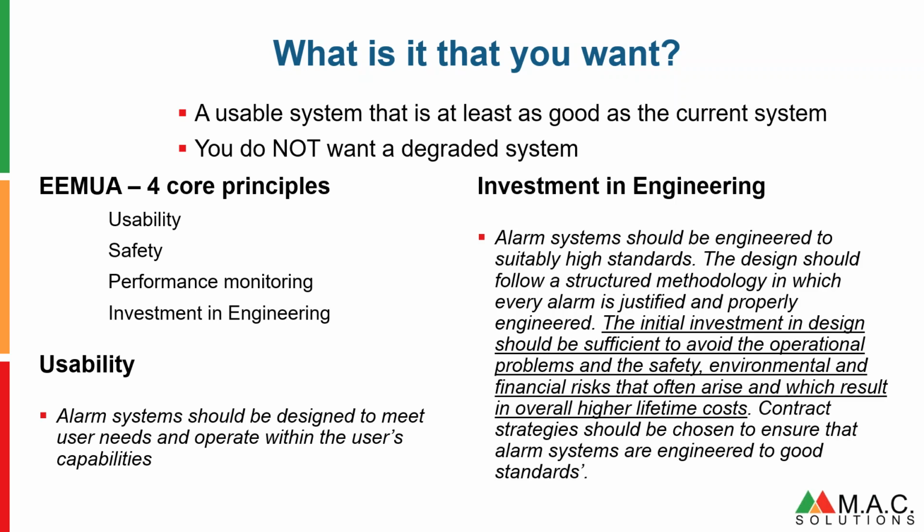What about investment in engineering? You're going to replace your system, for example. You're going to pay quite a bit of money to do so. Here, I've underlined the wording in one of the core principles from the EEMUA guidelines: initial investment in design should be sufficient to avoid the operational problems and the safety, environmental and financial risks that often arise, which result in overall higher lifetime costs.